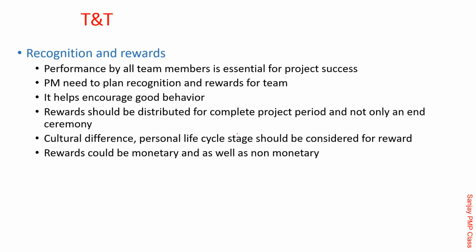Recognition and rewards: planning what the rewards and recognition are. Your typical approach should be that whatever you want to increase, give the reward to that. Whatever you want to discourage, plan your rewards and recognition in such a way that they encourage the good behaviors you believe in. So if you believe that working hard is very important on your project, plan your rewards around working hard. In some other project it could be different. It may not be working hard but working smart. So you need to plan accordingly, is what he's trying to say.